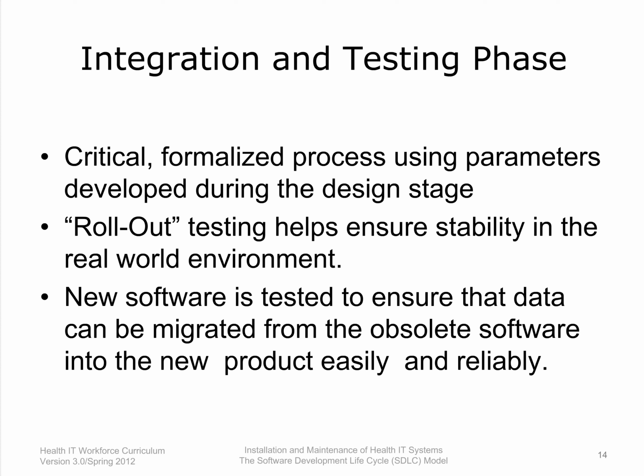Integration and testing is a critical step. If the software fails testing, it cannot be trusted to work. Approval of testing and test results is necessary before the project moves into the next phase, implementation.